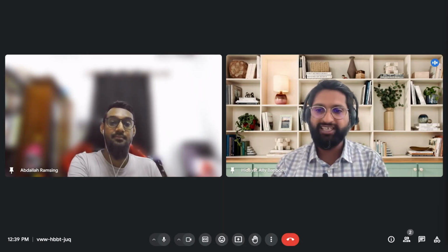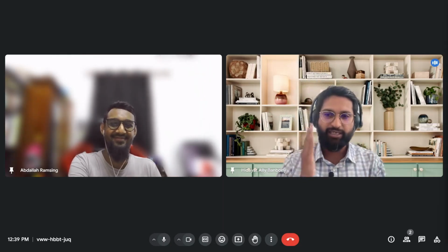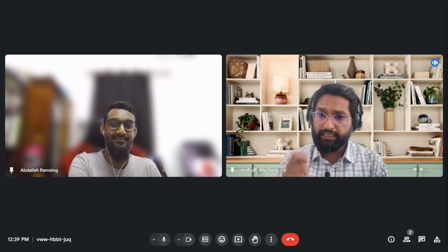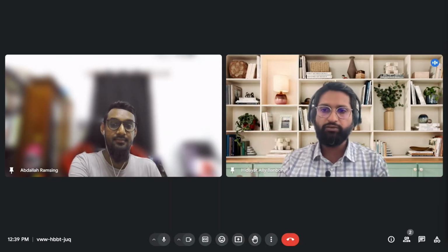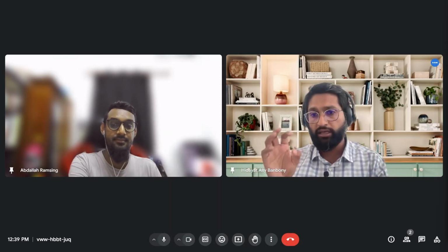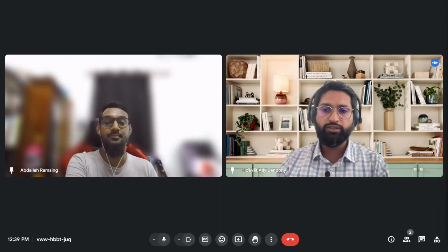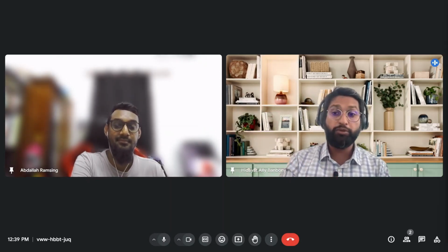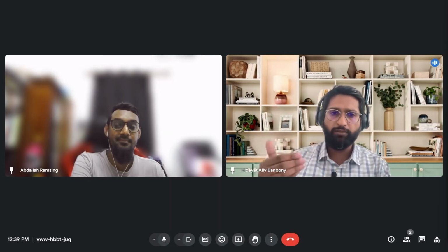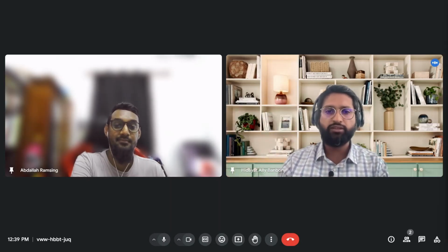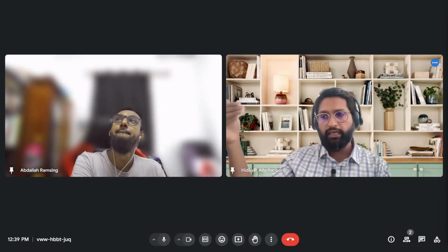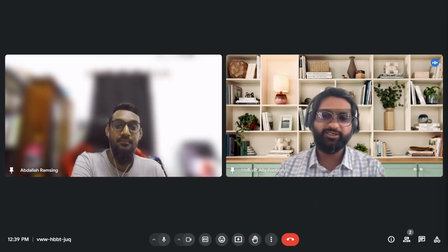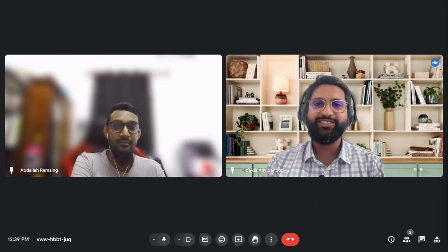Your time is money, right? Everybody knows that time is money. 30 minutes, time bound. These are my 3 items we need to take. Let's have a vote. Everybody votes, and you would see, okay, these are the 3 items we need to take. From there on, you have a post-retrospective whereby all follow-ups are done, and a mail or a communication is sent to the team. Okay, these are the top 3 we are taking. So this is assigned to these people. We are following up on that, and this is going to happen. So that kind of summarizes our discussion so far.